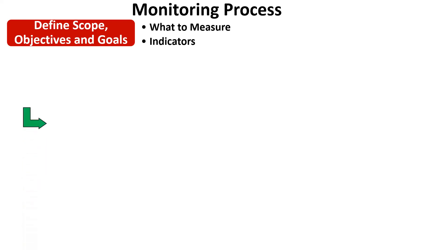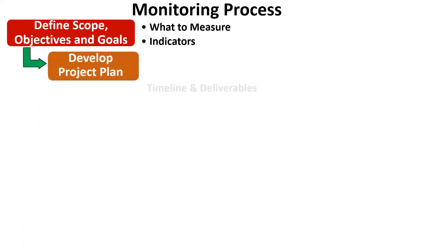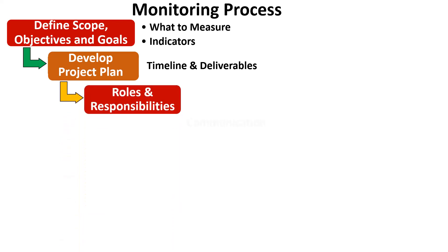Second, we need to develop a detailed project plan that includes the timeline, milestones and deliverables. This project plan can then be used as a basis for tracking progress during project implementation. If there is already an existing project plan, we can use it to compare actual progress and resource utilization with the plan. Third, it is important that clear roles and responsibilities are assigned to team members, and communication channels are established to ensure everyone is aware of their responsibilities and there is a continuous flow of information regarding the project, its issues and progress.